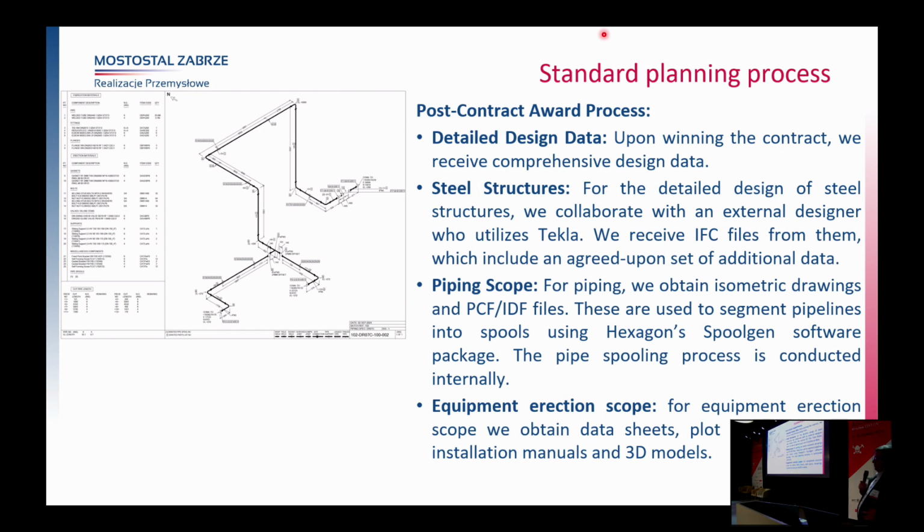After winning the contract, we are receiving usually much more of the data, and for the steel structure, usually if we have to install the steel, we also fabricate this in our workshop, and we hired the designer company with which we have already agreed standards, how they need to produce the 3D models with all the data we need. So this is the easy part.